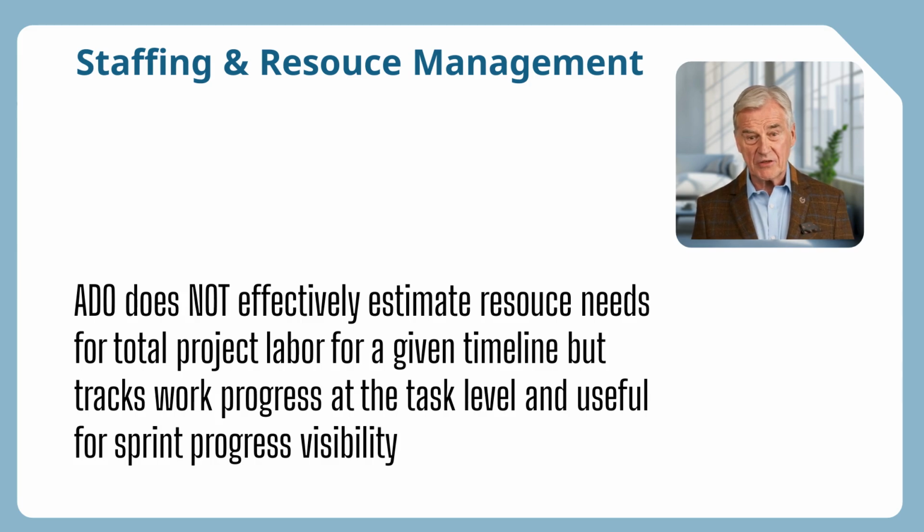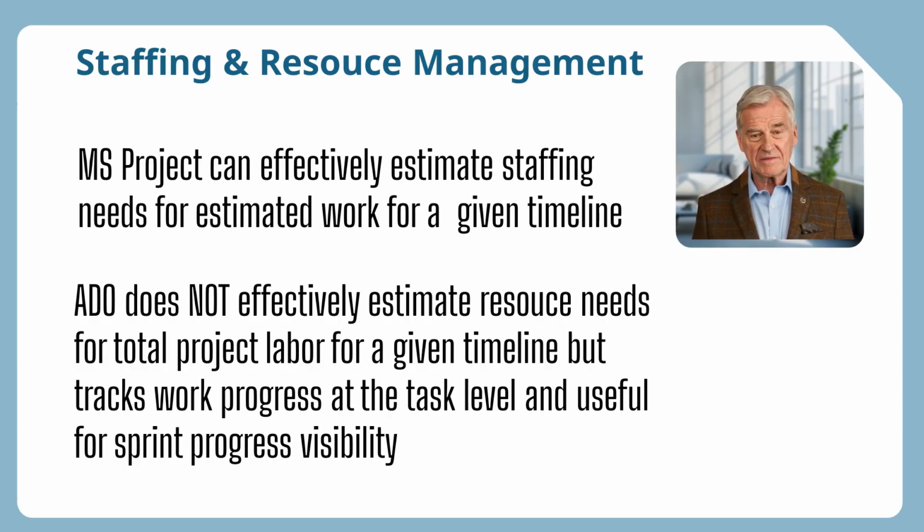ADO doesn't effectively estimate resource allocation across time. It mainly shows who is assigned to a story or task and tracks its progress. In addition, ADO capacity planning is mostly sprint to sprint and not project-wide. If you need to plan staffing needs at, say, 3, 6, or 12 months out, or by phase, MS Project is the better tool to provide that information and visibility.